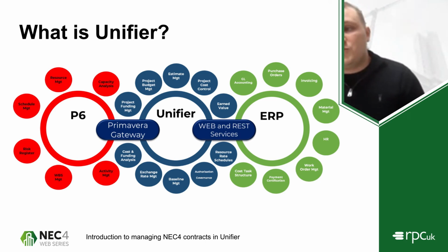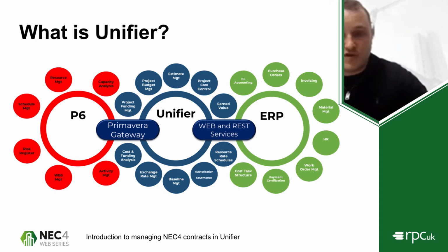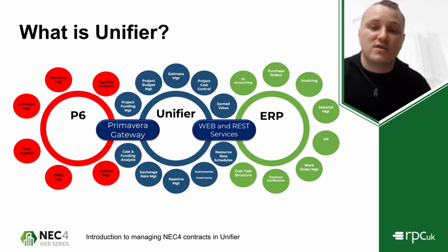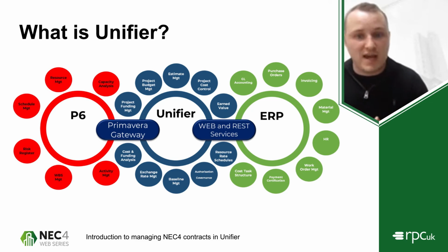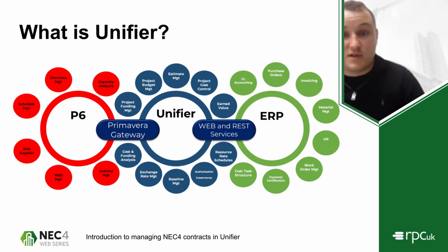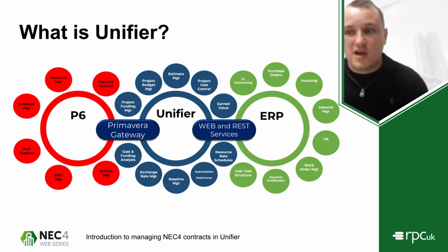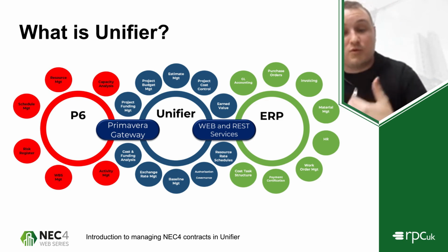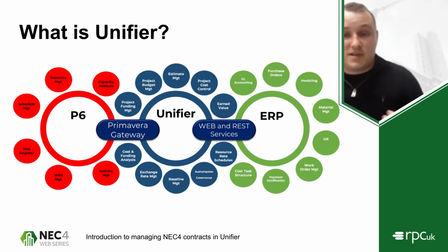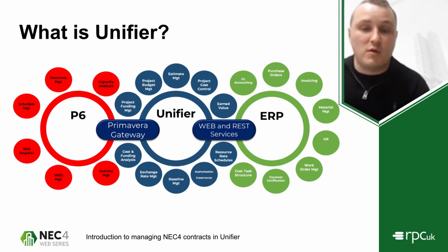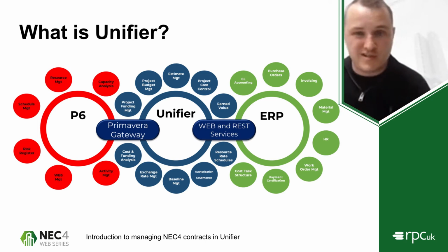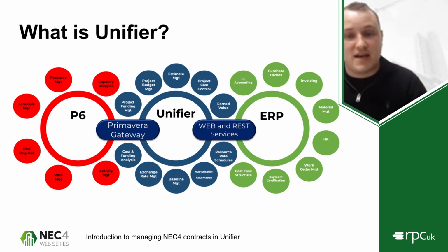Another unique thing about Unifier is obviously allowing you to build these business processes and these functions within that. But as it's an Oracle product, it also has native integration with P6 as well. So it allows you to pull data in from P6, which could obviously be useful for earned value management, for instance, but also in an NEC context, if you wanted to pull data from your P6 schedule into a particular workflow, or you wanted the latest planned completion date from your P6 schedule for your program submission to NEC, again, you can pull that data through, and it just makes life a lot easier.